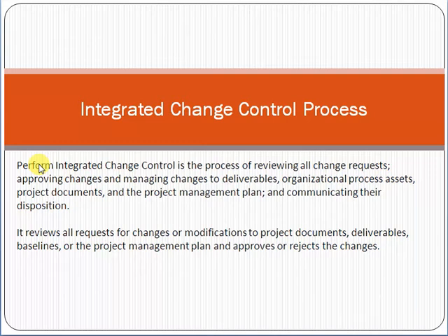Why, on what basis are we saying that it is a change requirement, a change request? Because see, this requirement was not part of the scope, it was not raised at the early time, and it was not documented earlier. So considering that this requirement is not part of the scope document, we will consider this as a new requirement, we will consider this as a change request. Then the other thing is that to accommodate that change, we need time and cost.